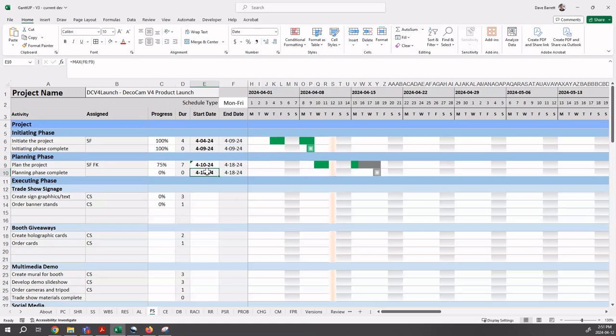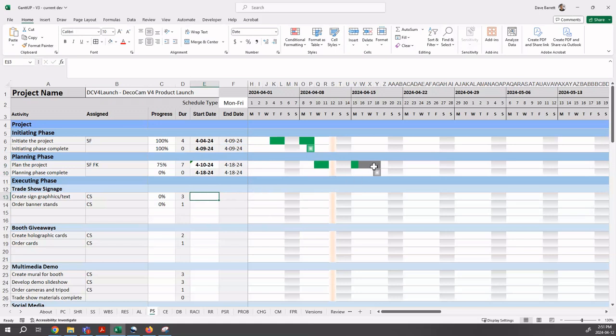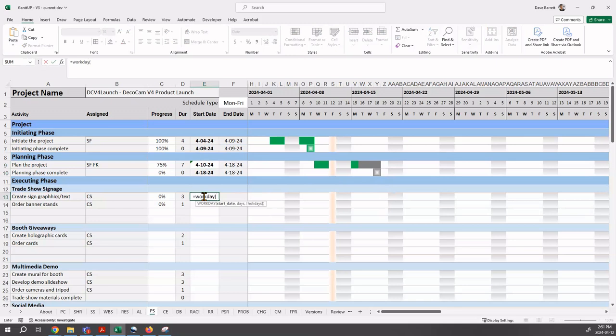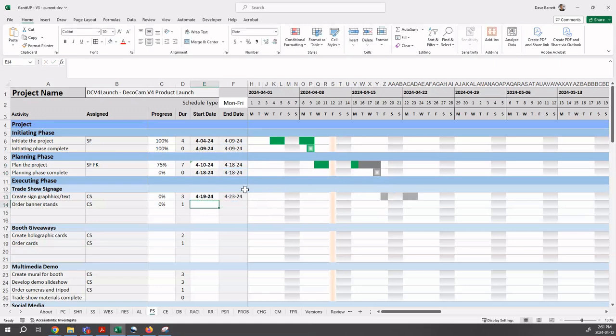So equals, we've entered using a workday formula. Again, here, if we wanted to have this occur the day after, this, on the Friday, we would say equals workday. And then we would say that end date comma one. And you notice how it does that.